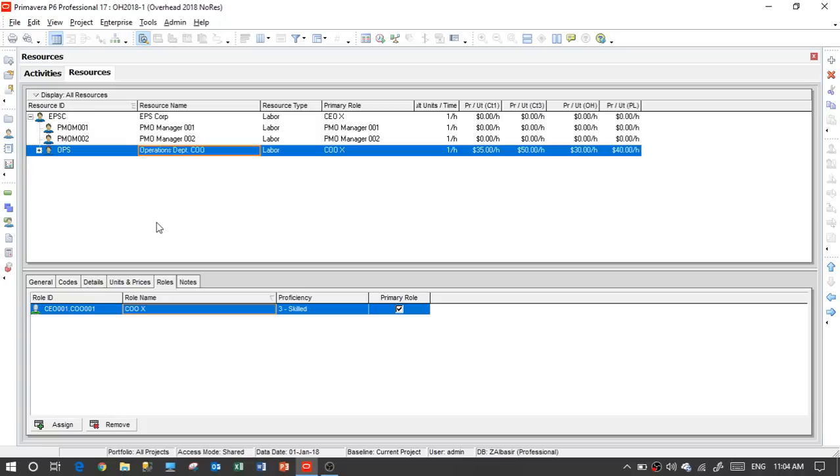However, even booking in the overhead doesn't mean it's bad, because if the team is booking their hours in the projects and creating profit, maybe it's also working and the corporate is getting enough profit to survive. So let's see how it goes. What I'm planning to do is create this schedule as an overhead for all technical team who are not assigned to a particular project, and they can book on it when they don't have a booking in the project's contracts.